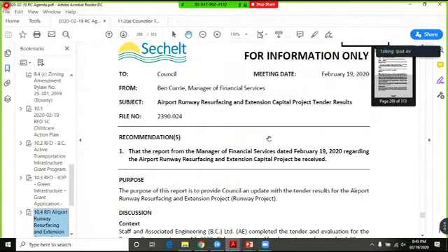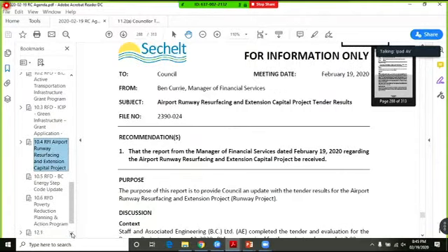That's an increase by $1.79 million. To break this down, just for information, the cost to just repave the existing runway as it is, so this is splitting the project into two parts, would be $1.543 million to just resurface and repave the existing runway. And the extension would cost 0.827 million, so 827,000. At this time, we're not asking for any decisions, and this report is for information only. Once the results of the grant are received, we will bring a report back to council and provide options and recommendations to proceed. Thank you. Thank you. Any questions of staff at this point? Councillor Toth.